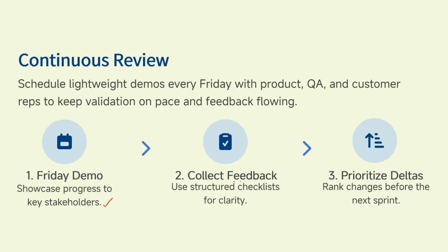They will collect all the feedback and they prepare a checklist. Okay, and they can also use the checklist for clarity, so that every feedback is genuinely collected. And obviously whenever you have multiple feedbacks, which one to work on is identified by prioritization. So ranking will be done with respect to this feedback, and whichever has high probability and high impact will be taken for the next sprint.